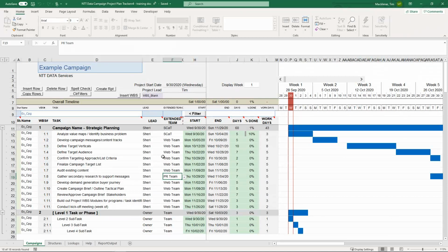Likewise, the start dates. Again, they're all built on formulas when the module's inserted. So you can either keep the formulas, and the formulas that build out this cascade reference the stop of the previous task. So that's how it knows this task starts after this task ends. So that's how it builds the cascade.